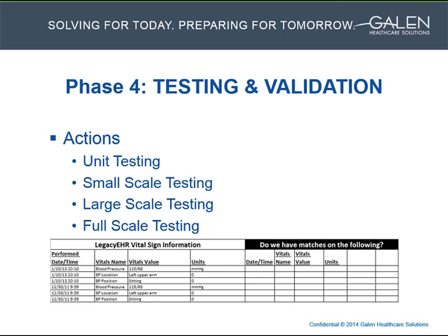The last phase of testing is full-scale testing. Depending on the target system and the client preference, full-scale testing may or may not be required for the conversion. During a full-scale test, all the patients and clinical data are converted to the test environment. It's kind of like a dress rehearsal for go live.